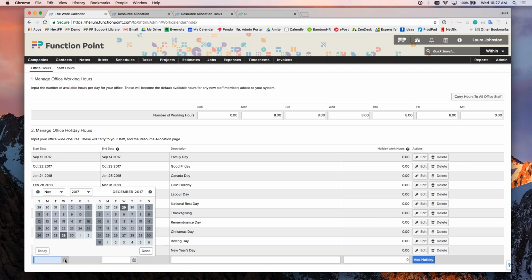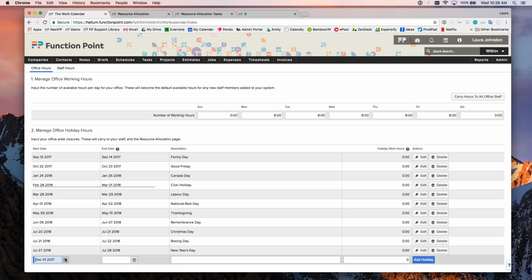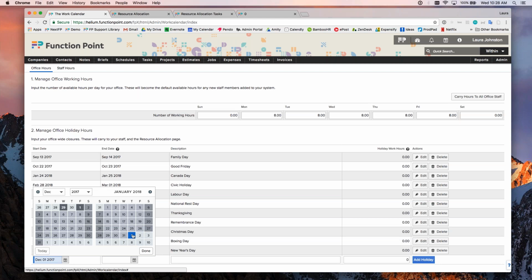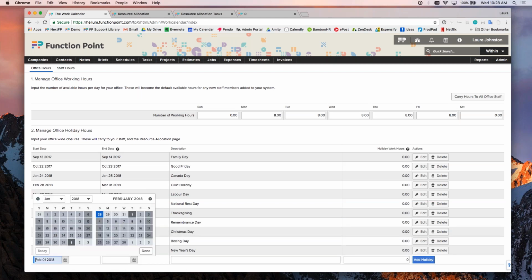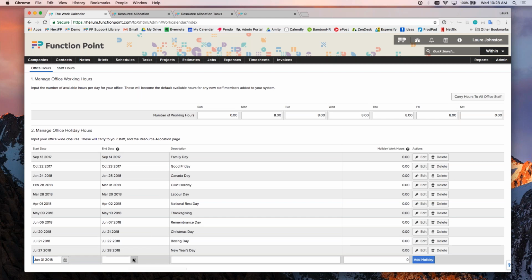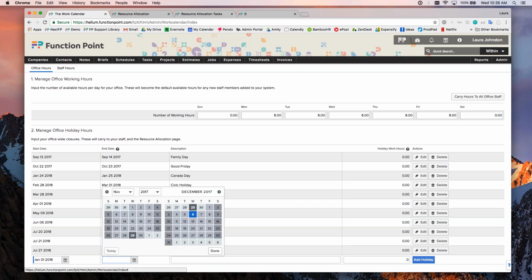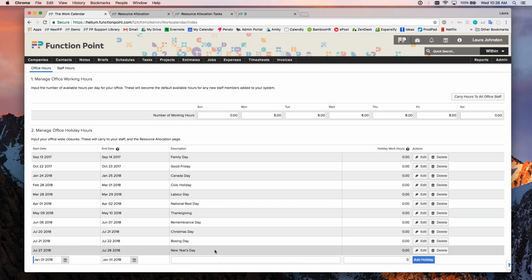So you'll enter in the date of your office closure. Let's say we're going to be closed on January 1st. There we go. We'll be closed on January 1st for 1 day, and that's going to be New Year's Day. And we're going to work 0 hours. So that's one thing to note. It's asking you here in holiday work hours how long you will be available to work on that day. So we'll set that to 0 hours.